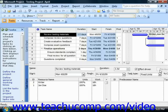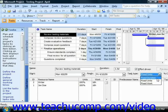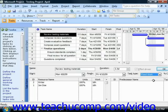Note that if you didn't want the addition of a second resource to decrease the duration of the task, you could choose Fixed Duration from the Task Type drop-down in the task form view, and then click the OK button to allow Project to keep the duration of the task fixed, but simply decrease the work hours attributed to each resource assigned, changing the units of work for each resource on the task. It is also possible to keep the work value for the task fixed if desired when creating resource assignments by choosing the Fixed Work choice within the task form view. This can often result in a durational decrease as well.